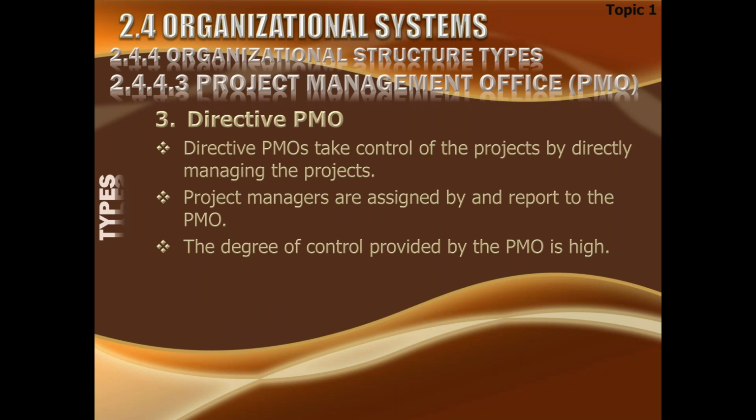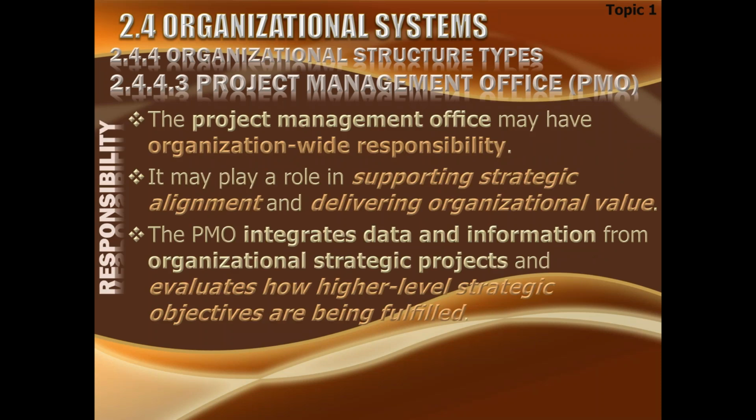The directive PMO takes control of the project by directly managing the projects. Project managers are assigned by and report to the PMO. The degree of control provided by the PMO is high. So this is what the three types of PMOs are.